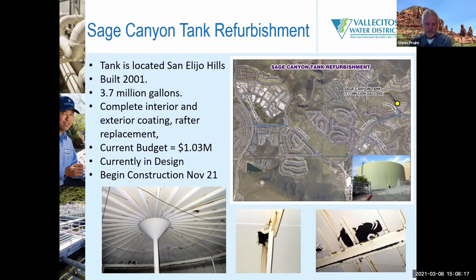Yeah, so that's inspection. What about the actual recoats? Are you on a standardized schedule? Yeah. We did a back... It's been a while, but basically a tank schedule for rehabilitation, and we're on a 10 to 12 year cycle. We push them out to 15 at times when the coating's good, especially on the exterior. But the interior is usually 7 to 10. We're hoping the new coatings last closer to 12, but they're new, so we'll find out. The manufacturer promises that they'll outlast the old coatings, but again, nobody's used them for that long yet because they've only been out for 5 to 7 years. Right.